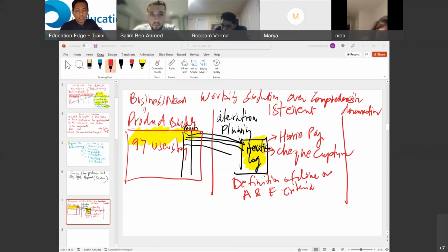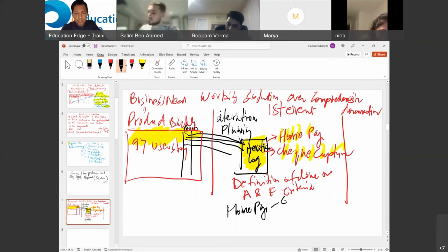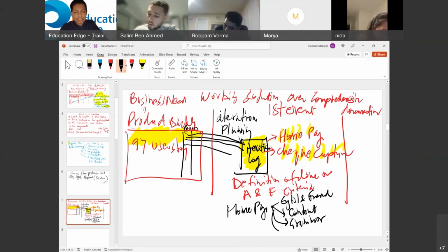So you say to the product owner, well, in the next 1 to 4 weeks, we are giving you the homepage and we are giving you the check capture. Can you please provide us the acceptance and evaluation criteria? And the product owner says, well, for homepage, as long as it is in English and French, as long as it contains the content that I am providing you, and as long as there are no grammar errors here, and as long as the font is exactly same as the previous font, or sometimes called corporate identity, as long as you are maintaining my corporate identity, I'll accept these two features.